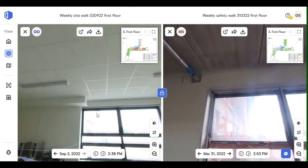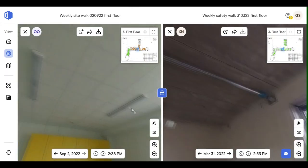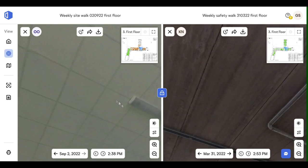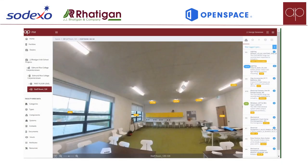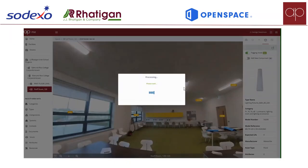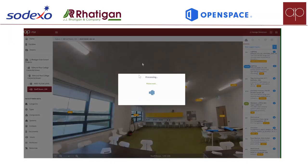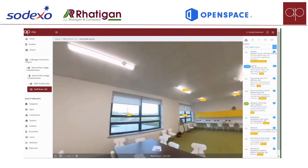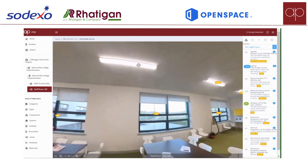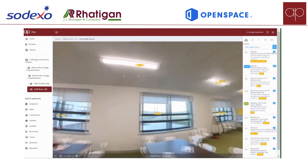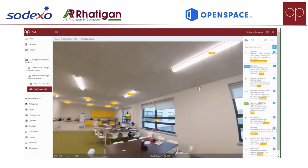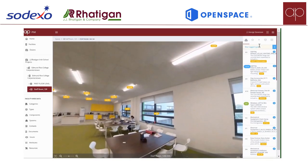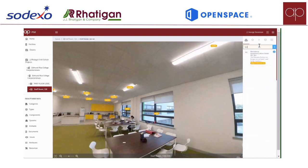Rattigans use OpenSpace to check the BIM model against reality, but it's also great for FMs who want to see what's above a ceiling. When we connect the OpenSpace 360 to the staff room in ActivePlan, the validated set of assets from COBie appear in the panel on the right. The FM team can verify that everything was installed and they have something they can keep up to date with new 360 photos whenever anything changes. When we paste a tag on the photo, it's actually written to the database — that's why you can see the colours: green means they've all been verified, blue showing how many still need finding.